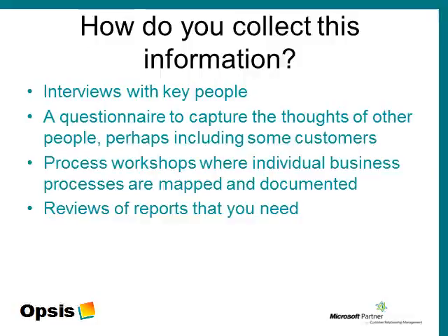Process workshops require discussions where the detailed tasks and the people responsible for them, together with the outputs, are documented. This is often done using sticky notes so that they can be readily moved and rearranged. Once the sticky note document is prepared, it can then be transferred into Visio or PowerPoint or another similar tool.